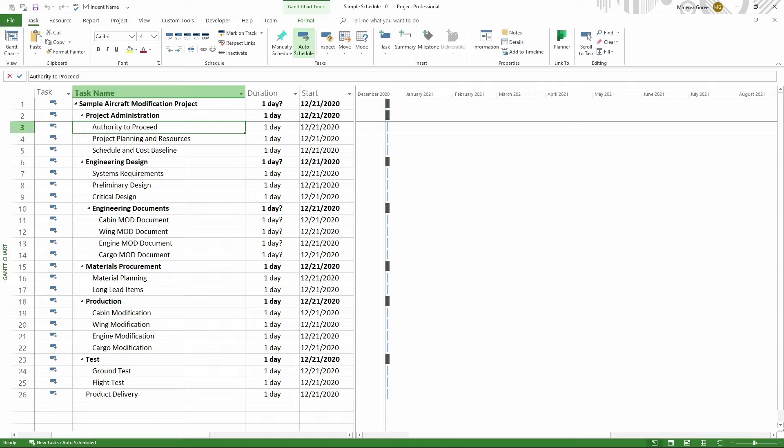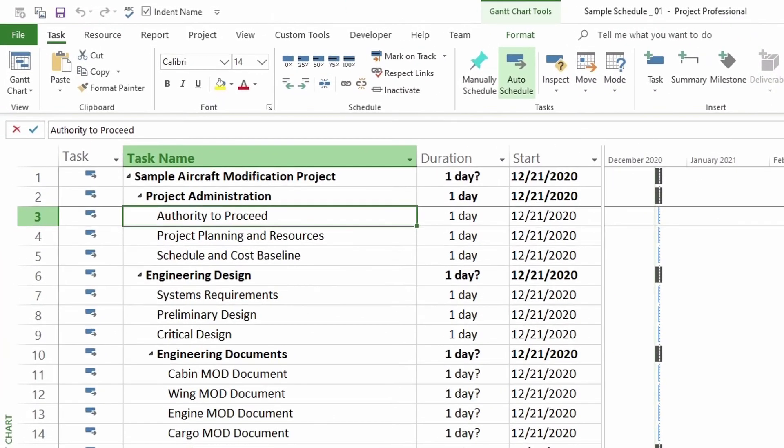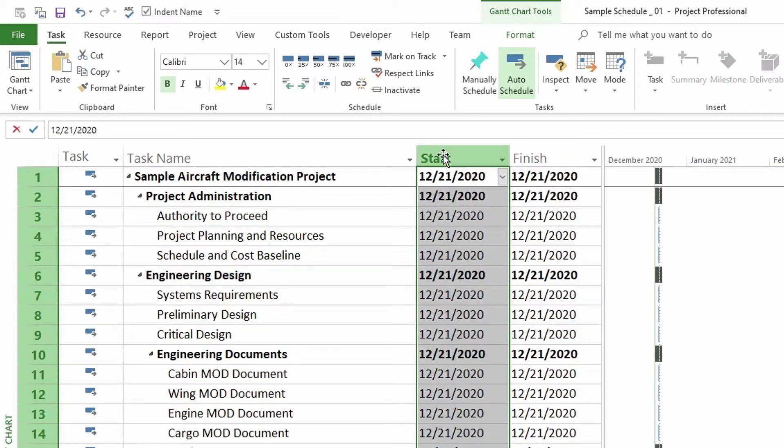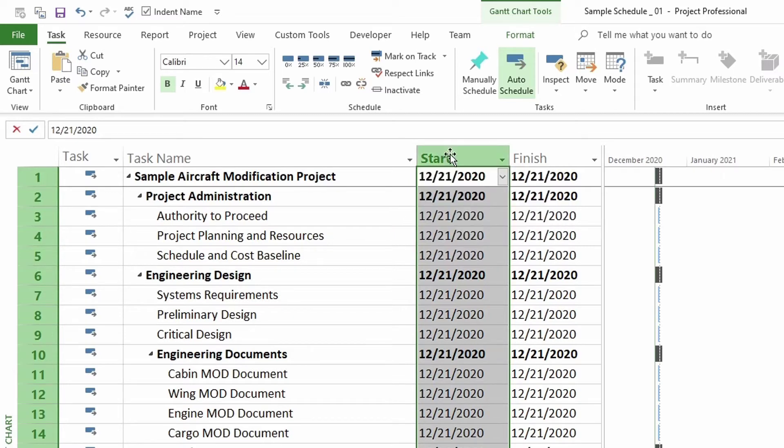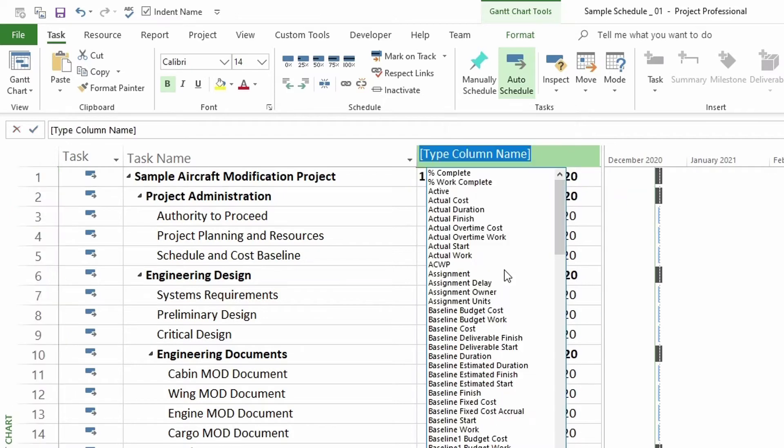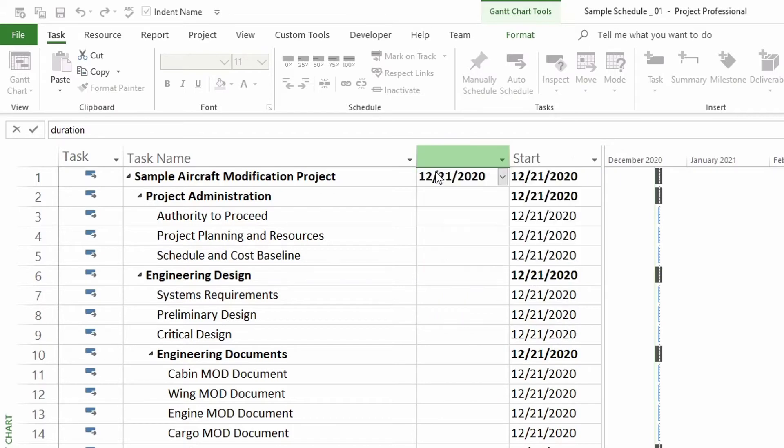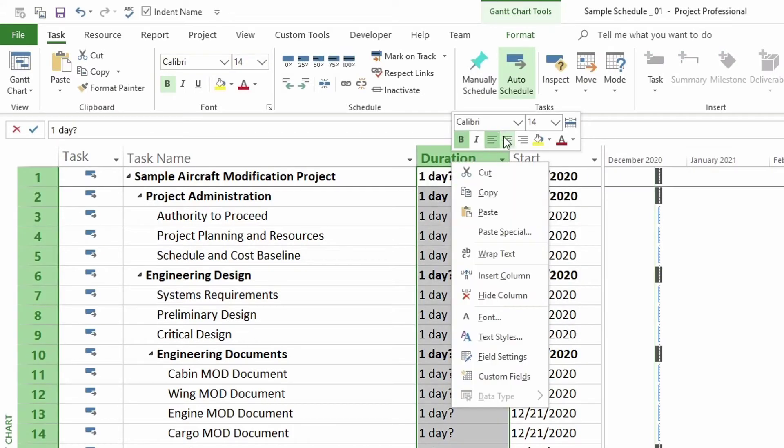The easiest way to define a milestone is to give it a duration of zero days. I already have my duration column. So if you don't have this, I'm going to take it off and then we're going to add it back in. You first select where you want to add your column, which is to the left of this. Click on the heading of this column and right click and then click insert column and then choose or type duration and then choose that or click enter. And then I have my duration back in here.